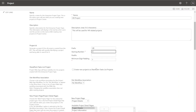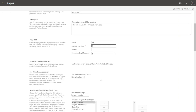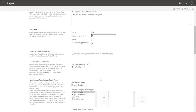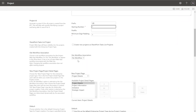There's an option to create new projects as a SharePoint task list — we do not want to do that. Essentially it's a very lightweight project, just a list of tasks in a SharePoint list. It's not what you want; you want enterprise projects. We can create a workflow to associate with this, but we're not going to do that at this point. I'm just going to have a standalone project.